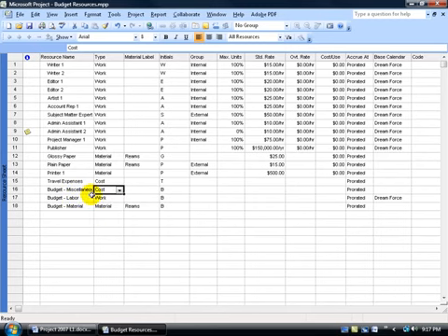How much am I budgeting aside for all my cost resources, which is just one, the travel expense? It's going to be in currency, so let's say it's $2,000. I'll show you in just a minute how to assign $2,000 to your budget for your cost resources. So when you start actually accruing your travel expenses, you're at $1,200, $1,300. As long as you're under $2,000, you're fine.